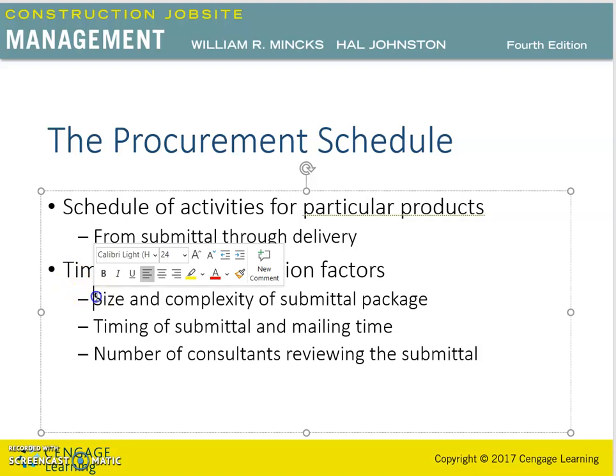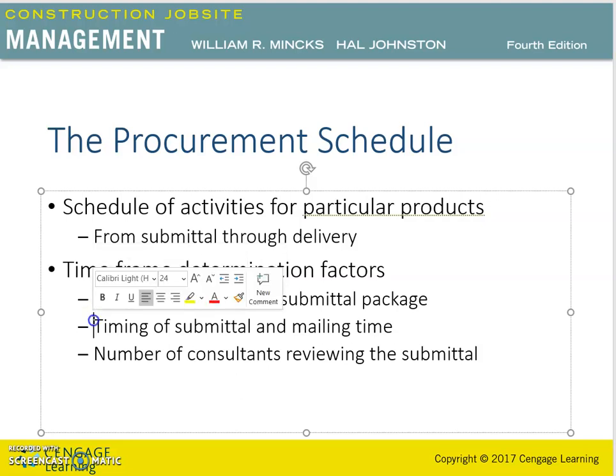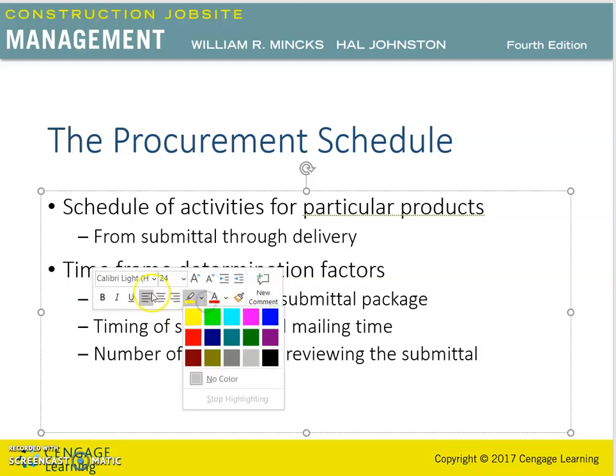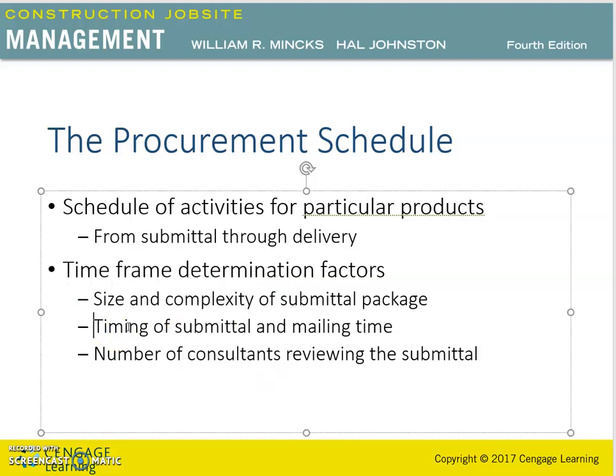If a submittal is divided into packages, the approval time would be less per package than it would be for the entire submittal. The complexity of the submittal has a large influence on the review and approval time. The timing of the submittal and mailing time.